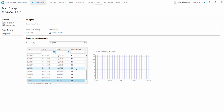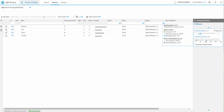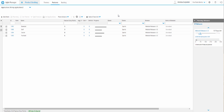All the sprints are updated to 15 story points velocity, giving us a new total of 330 story points — looks much better. Stepping out of configuration, the right-side pane now shows 350 story points instead of 2,250, and we can see our bar slowly filling up. All our features are created. Let's do a quick review: we started with themes — our Sports theme — and I also created an Electronics theme for diversity.